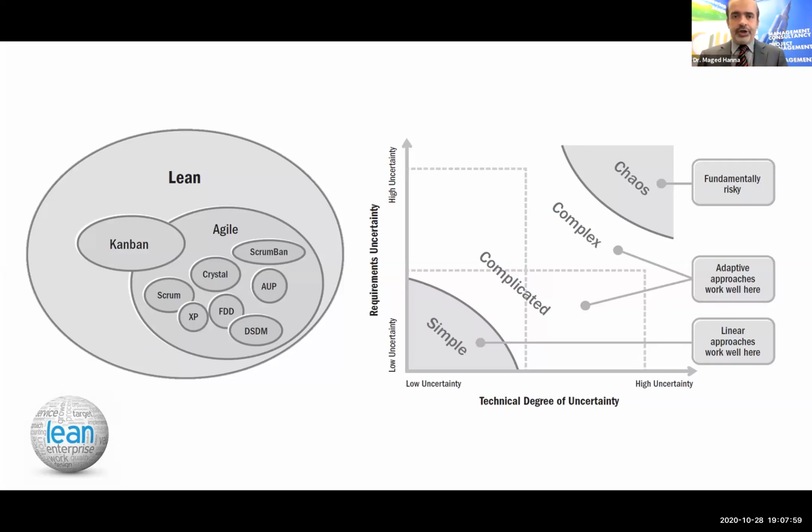This is why you can find a design and build contract, where the main contractor hires under him a group of designers, from concept to structure to MEP, all types of designs, but under him. Why? Because the main contractor is taking the full risk towards the client.